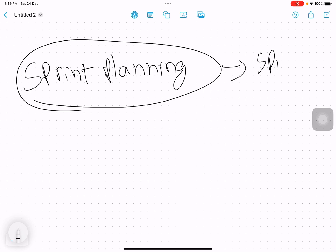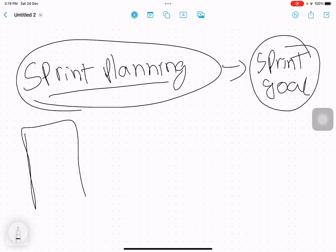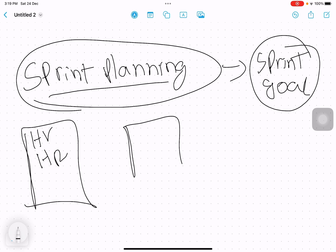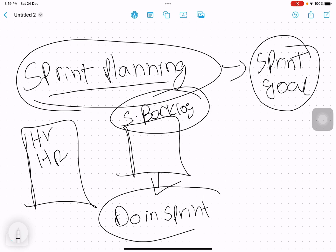In sprint planning, we make a sprint goal. To do that, we take the product backlog — which is a list of all prioritized requirements by high value and high risk — and from that product backlog we create the sprint backlog. The sprint backlog is an important document that tells you what you are going to do in this particular sprint. We put all the selected user stories into this sprint.